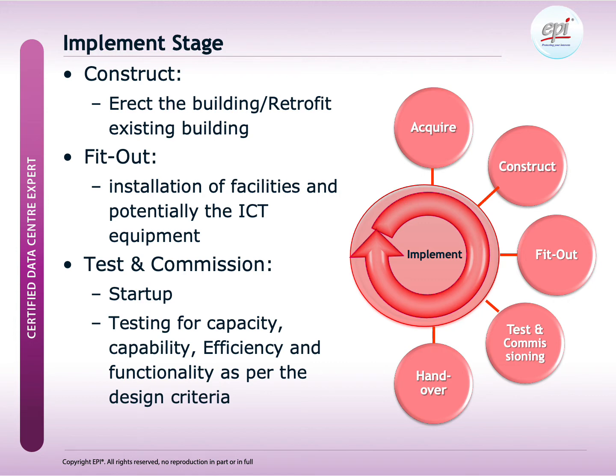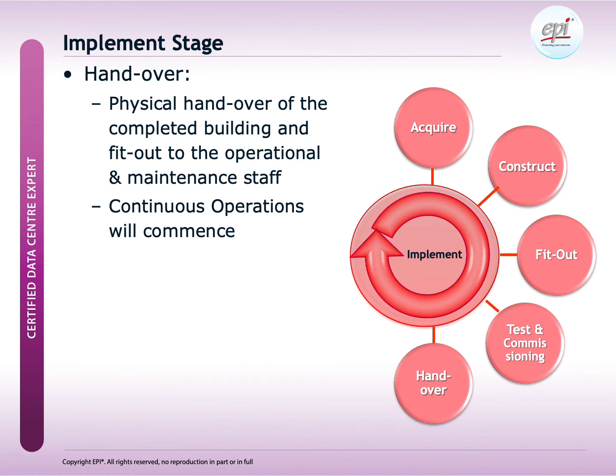The testing and commissioning phase involves the startup of the data center and the testing for capacity, capability, efficiency, and the data center functionality as per the design intent. Handover is the physical handover of the completed data center to the operational and maintenance staff. So now continuous data center operations will commence.